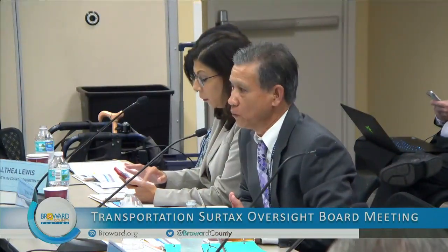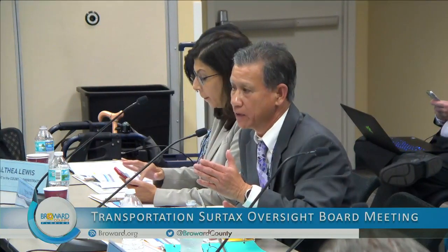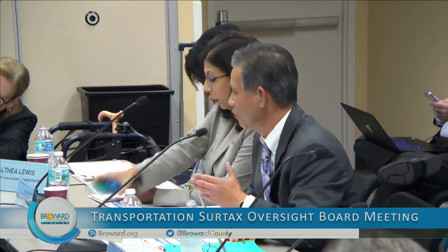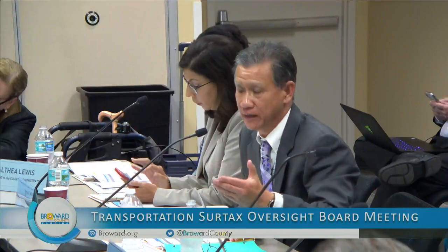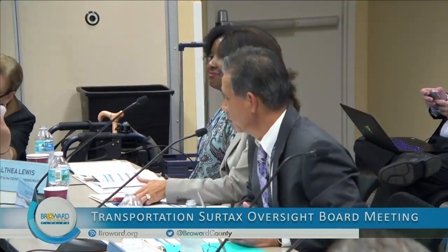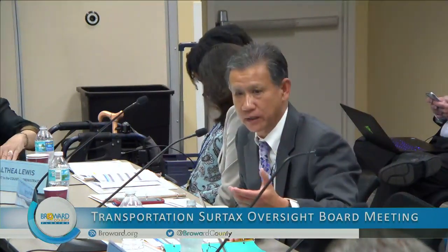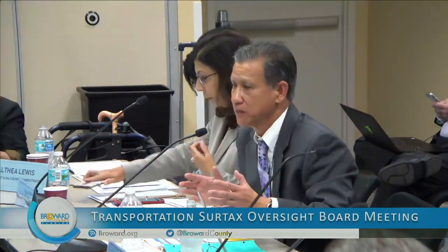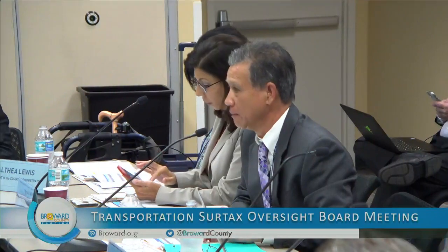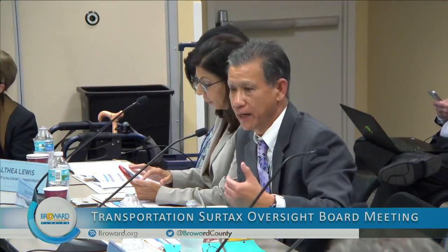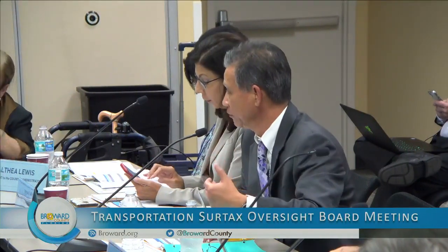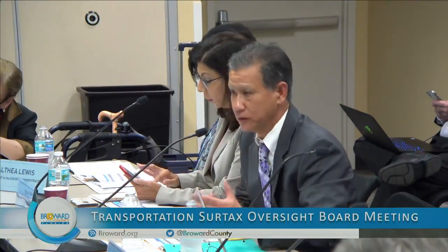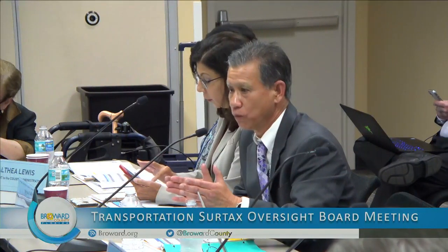And what we wanted to make sure is that we don't have a lack of coordination. We don't want to go in and implement, let's say, a county project, and then a couple of months later a city comes in and implements their project in close proximity. So in these areas where we see this clustering, we want to evaluate them and provide a project delivery method of working together with the cities, FDOT, and the MPO, so that these projects can, where applicable, be done together.